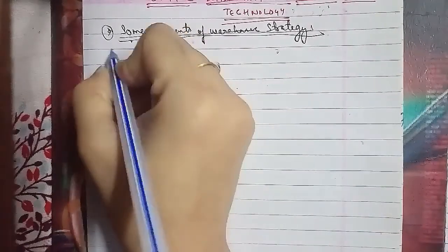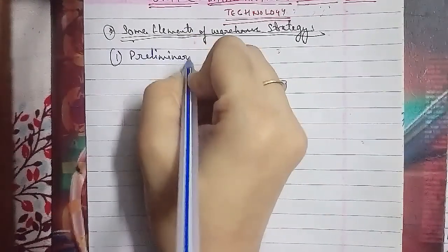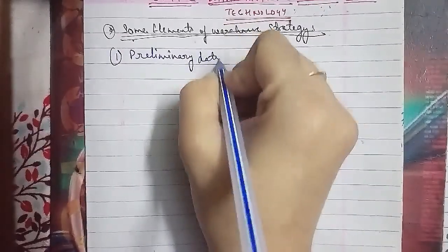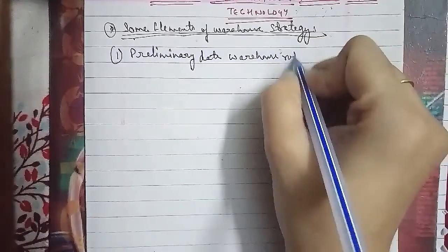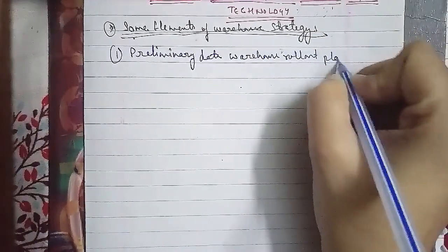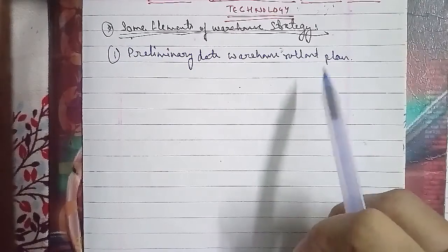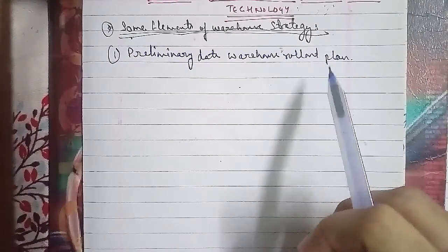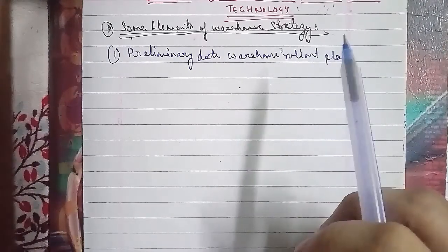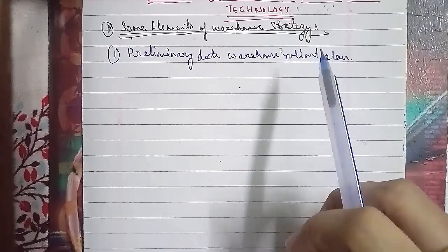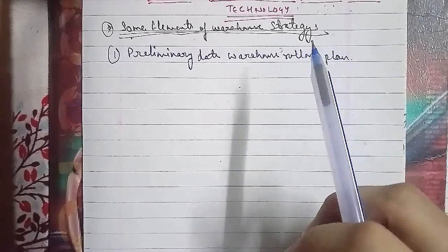Preliminary data warehouse rollout plan. Not all the user requirements can be met in one data warehouse project; such a project would necessarily be large and dangerously unmanageable. It is more realistic to prioritize the different user requirements and assign them to different warehouse rollouts. Doing so allows the enterprise to divide the warehouse development into phased, successive rollouts, where each rollout focuses on meeting an agreed set of requirements.